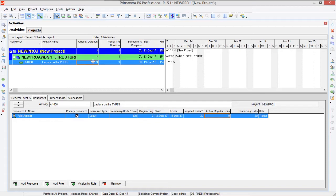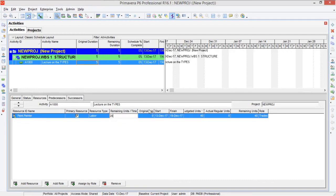Now what happens if you deliberately change your unit time? You need to see whether the change comes in the duration or in the budget units. Let's change from 8 hours per day to 10 hours per day and see what happens. You can see the change has occurred in the durations — the durations have been reduced to 4 days. That's how it works with the Fixed Units per Time resource type.